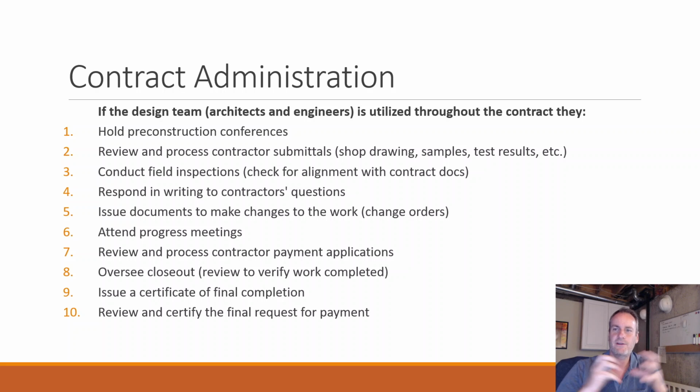The reason is that you have this team together, and your architects and engineers, your design team, can hold pre-construction conferences, make sure everyone's on the same page and answer any questions. They can review the submittals, do the field inspections and answer questions, handle change orders and progress meetings,